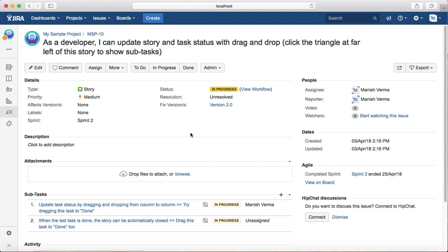The other advantage is the tracking, so it gives you the flexibility to track the progress of a particular story. Depending on the subtask completion or progress, you can actually see where the story sits at the moment or what is blocking at the moment. So if there is a particular subtask that is being blocked, then that can be actioned by the Scrum Master and resolved. So that is all the advantage and what exactly a subtask is within the JIRA software.